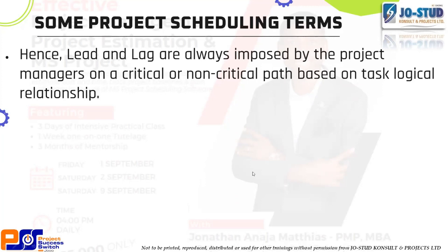But there are some tasks and activities that as a project manager, you don't play with. Immediately you finish planning your schedule, I'll show us how to do that. You need to discover your critical path. Once you have discovered your critical path, all the activities there, you take them seriously. Don't waste time on them and don't put any risk on them. Put your best resources there, put your best hand there.